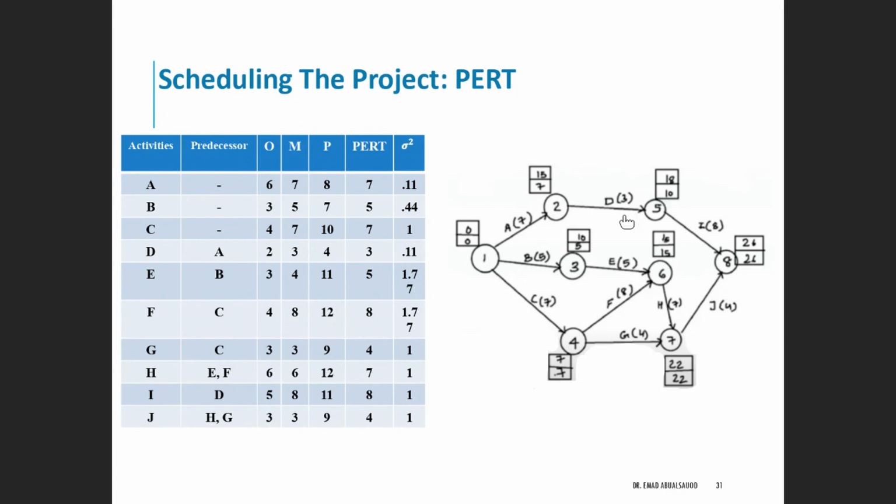So how I can find the critical path? I follow events that has the maximum start time equal to the minimum start time. عندي هذه. This one no is not. This one yes, but I'm not going to go to 6 through 3.